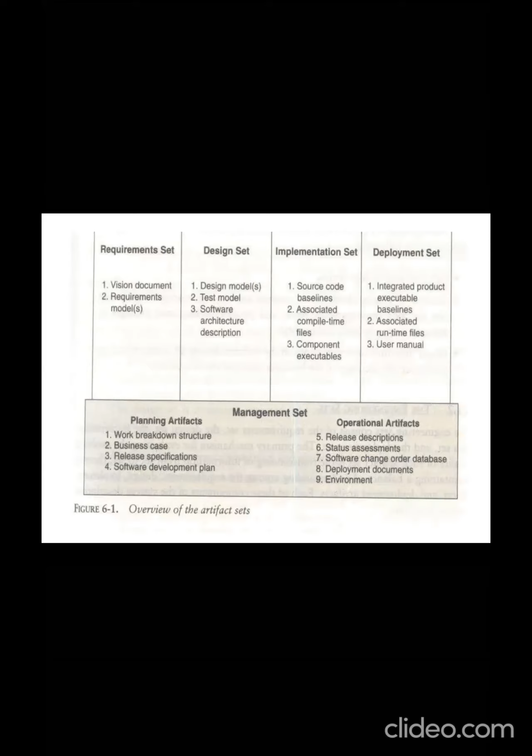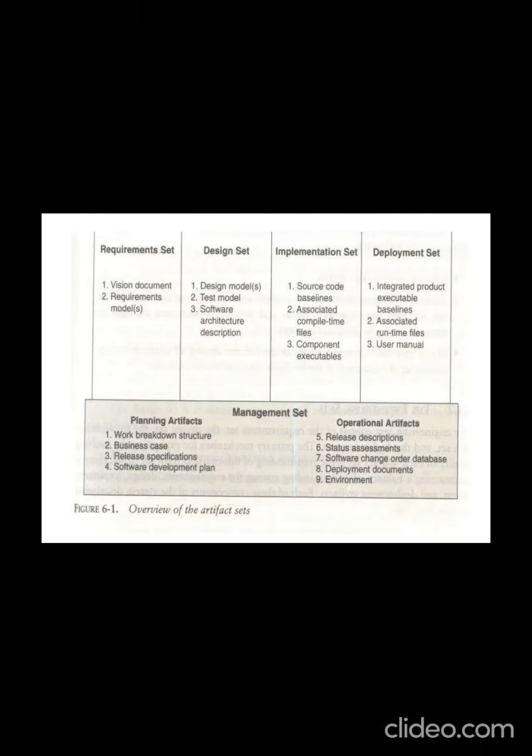So first we have to move to the engineering set. The engineering set consists of requirement set, design set, implementation set and deployment set. I already told you. So requirement artifacts are evaluated through a combination of analysis of consistency with release specification, and analysis of changes between the current version of requirement and previous version should be checked.